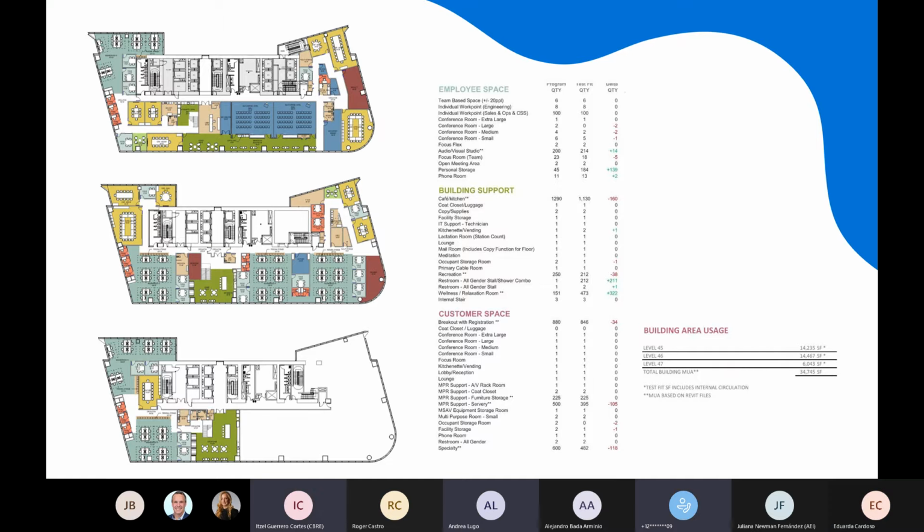Okay. So one little comment on the stairs. I just wanted to reiterate something that I said to everyone last time we met, which is a goal would be to see if we can set those locations before September the 7th so that they could be incorporated into the GC's shell work versus us trying to have to cut these things in at a later date.